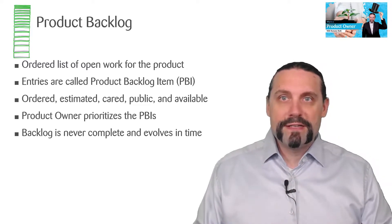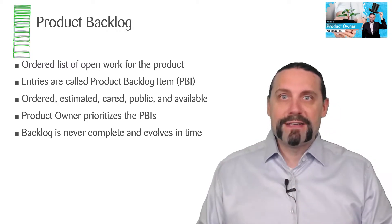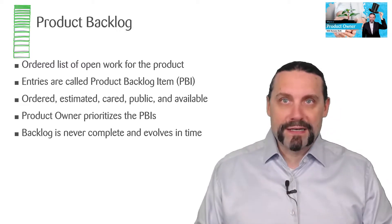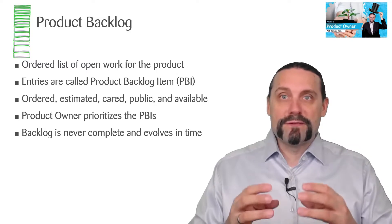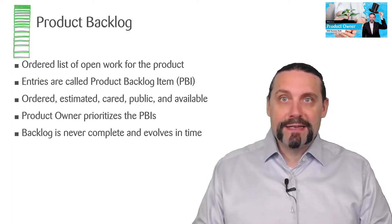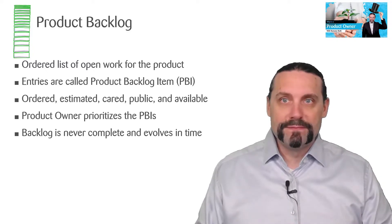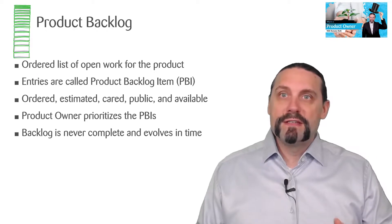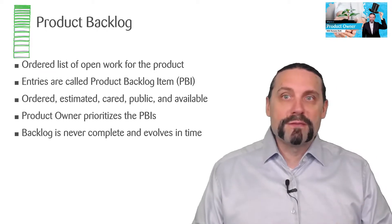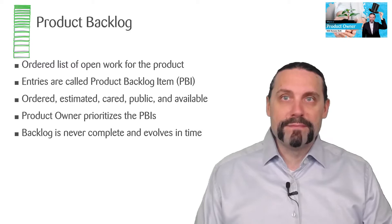The product owner prioritizes the product backlog items and has the final say about the priority in such a product backlog. Because a product evolves, a product backlog is never complete and it evolves over time.